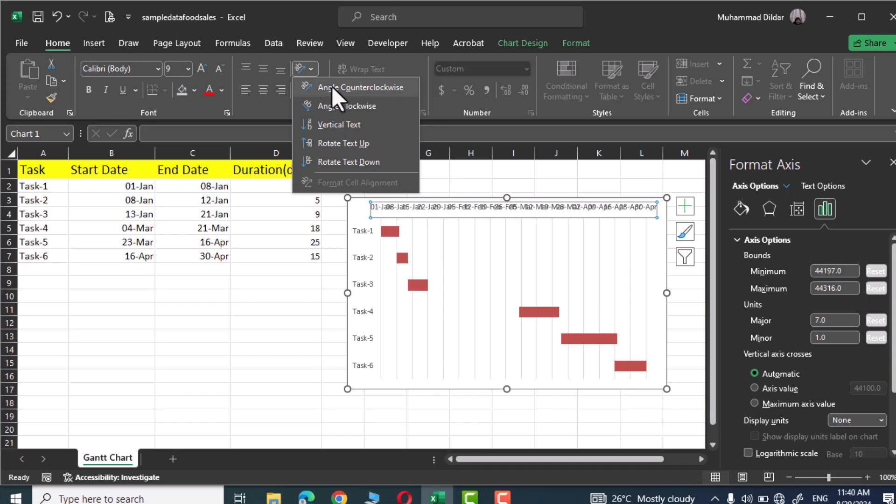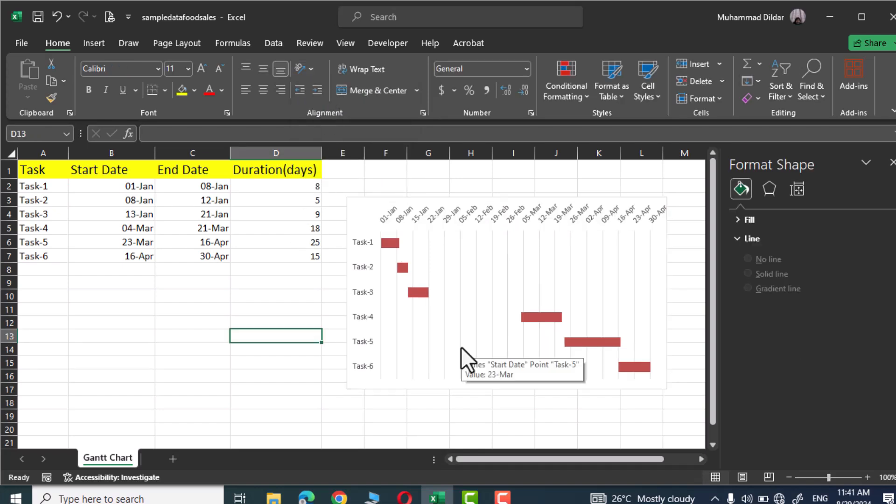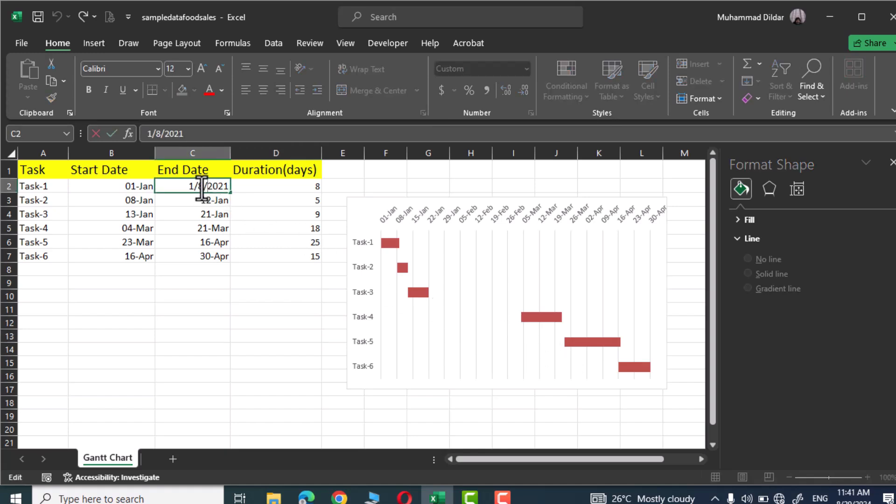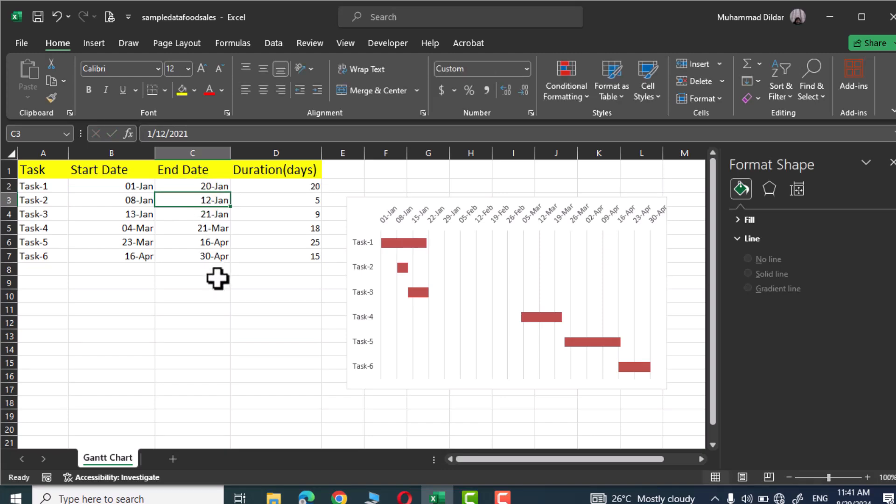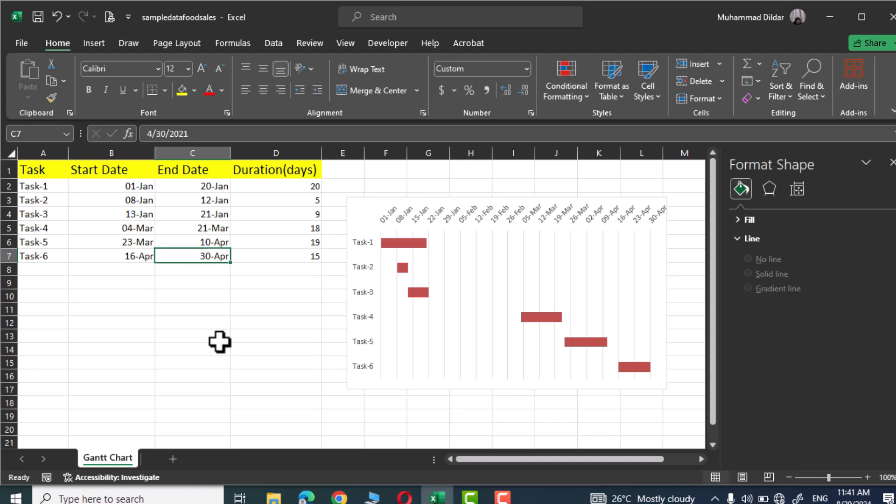Now if you are going to change any of the dates the Gantt chart would make necessary adjustments. Let me show you. I'm gonna change this date from 8 to 20, press enter, and there you can see task one extends to more than two weeks. Similarly over here I'm going to make a change, instead of 16 I'm gonna insert 10, press enter. And there you go, whatever change you are gonna make over here would be reflected in the chart.